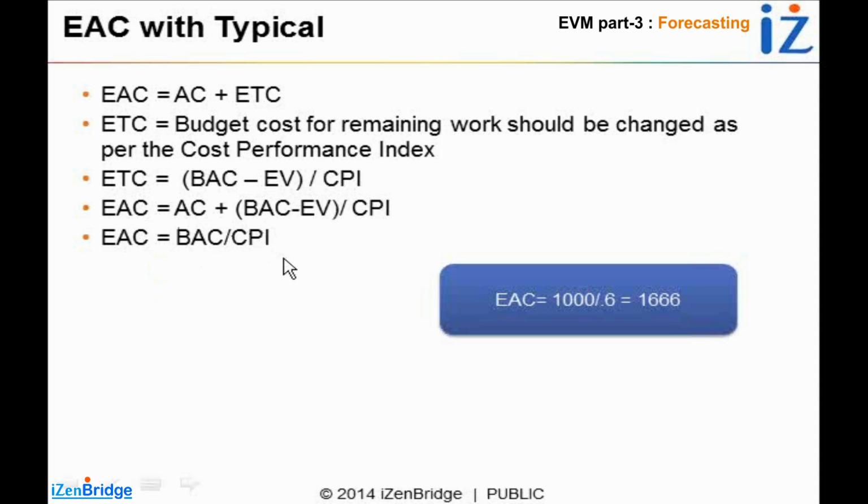In the PMP exam, we have not seen questions where the schedule performance index should be factored in. But in case the question specifically talks about it, that in order to calculate the remaining performance we also need to take schedule performance into account, in that particular case you can divide the remaining work by SPI as well.